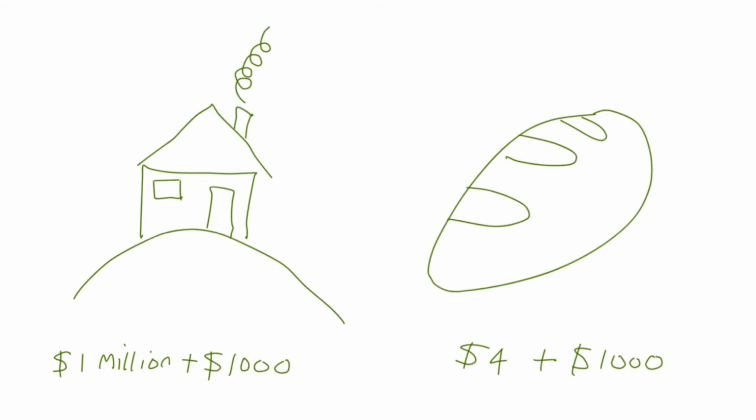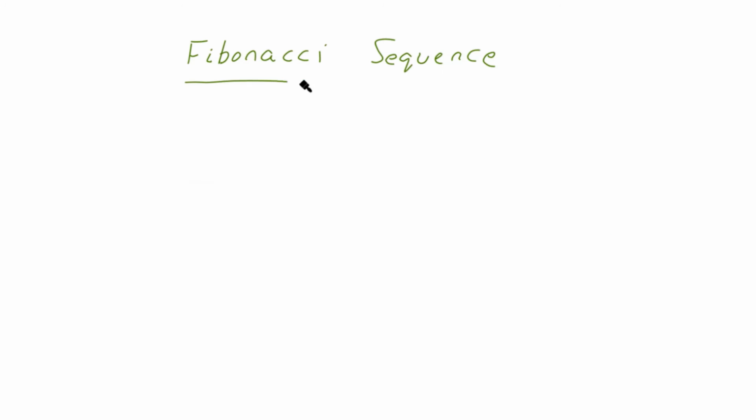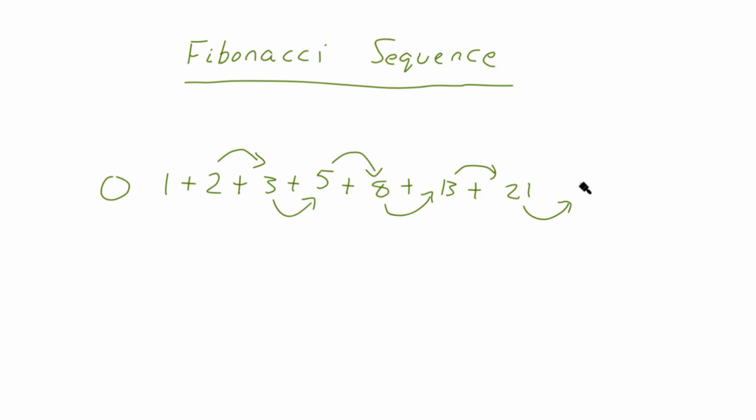So the most common approaches here are the Fibonacci sequence, which essentially is derived by adding the two previous numbers. And then some teams use a modified version of a Fibonacci sequence to round up the larger numbers.